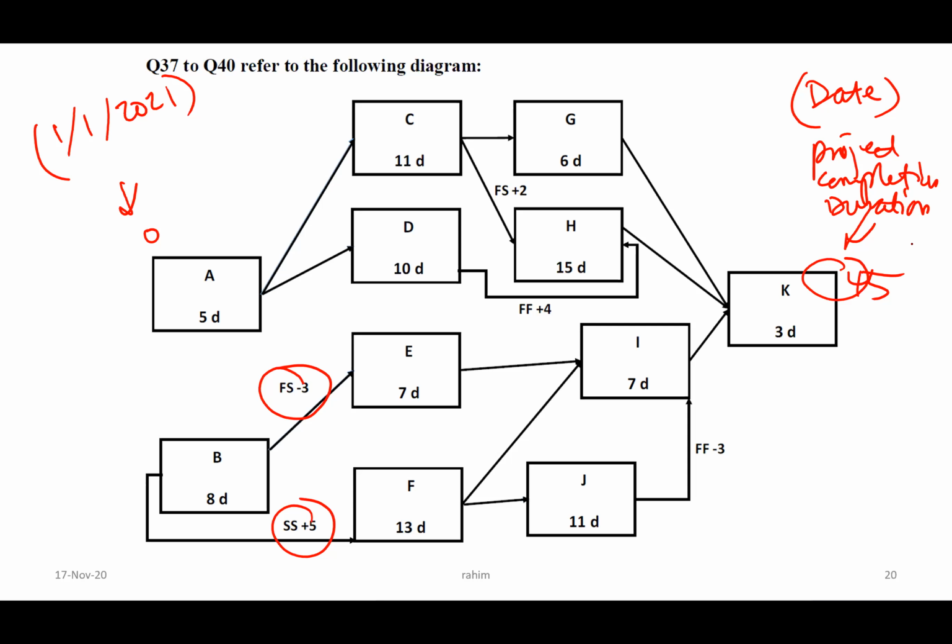But if, for instance, we give only 6 working days, etc., then basically you need to take a look at the calendar. Then only you will get the date of the project. So that could be one question that we normally ask: project completion date or duration.